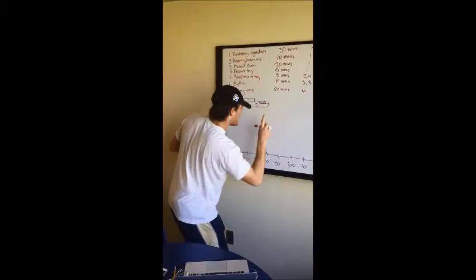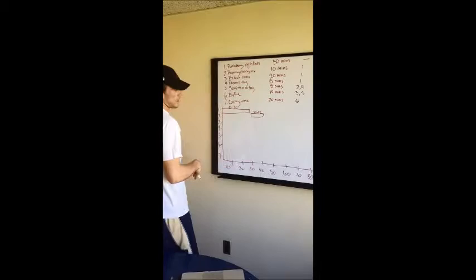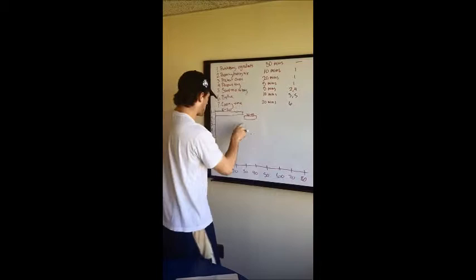So now our third step is preparing the oven. In order for the oven to heat all the way, it takes 20 minutes. But we can't do that until our ingredients are bought. So this again will start at 30 minutes and will end at 50 minutes.